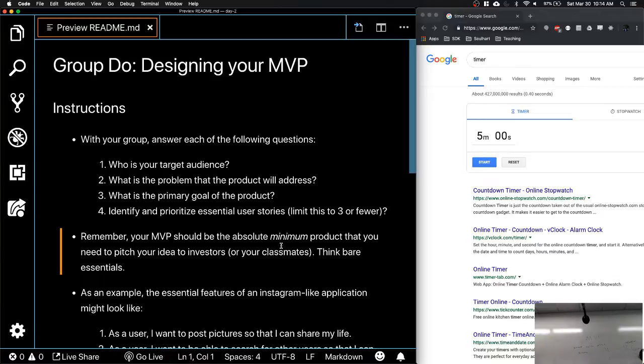Ideally, today is Saturday, maybe by Monday or Tuesday or Wednesday, you should be able to at least complete the MVP. At this point your base, your foundation is there, and everything after that is additions to your website. We talk about project milestones. So MVP would be a project milestone for you. Do the frills last? Yes, exactly.